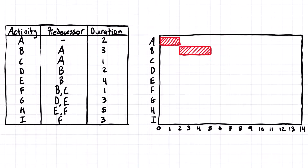The same is going to be for activity C. It can't start until A is done, so again we find where A finishes, which is at the end of the second day, and then activity C is going to pick up at that same point, which is also the beginning of the third day, and this one is just one day long.